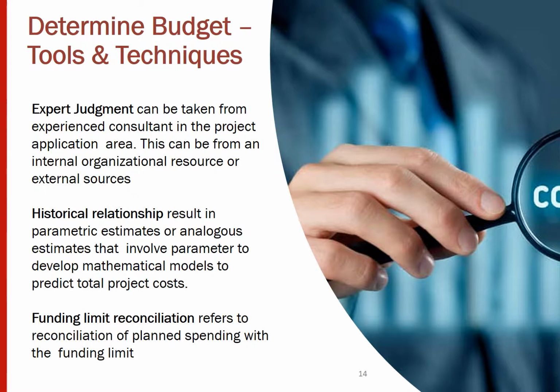Funding limit reconciliation technique is used to ensure that the cost on the project is budgeted or spent as per the availability of the fund. For example, if the project can get funding only up to 50,000 a month, the project budget should be planned accordingly.